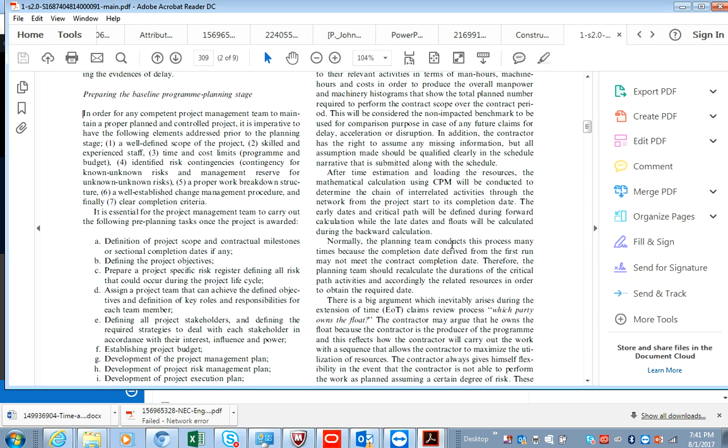On average, for any high-rise building, you're bound to probably have anywhere between 90 to 115 apartments, okay? And on average, the handover from start of partitioning for the services is usually between 22 weeks for the normal standard apartments to 26 weeks for the higher end apartments. And then it could go up to at least probably 32 to 36 weeks for the penthouse apartments.